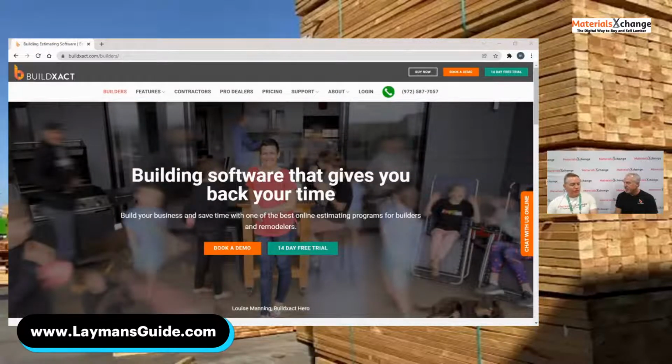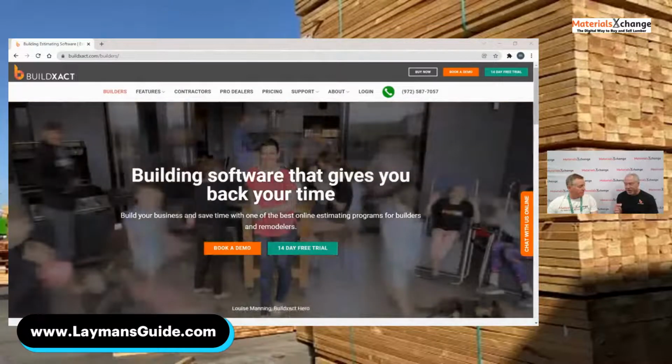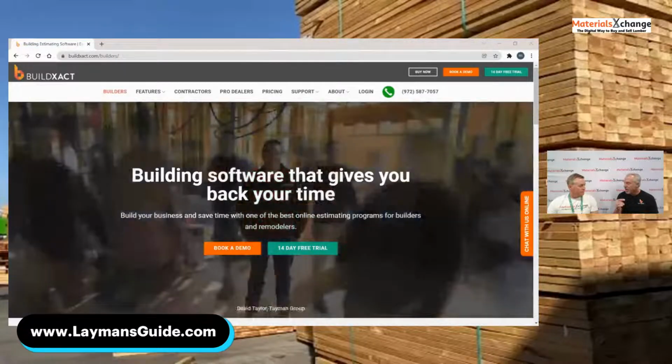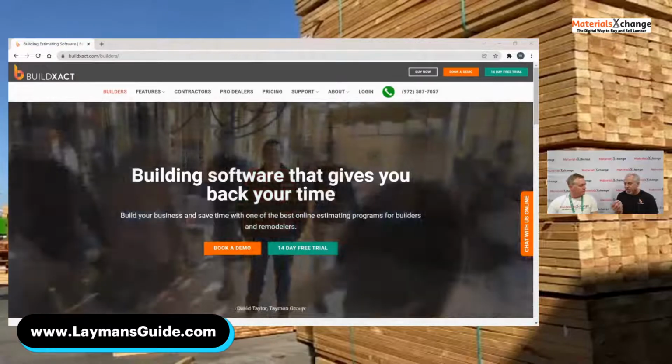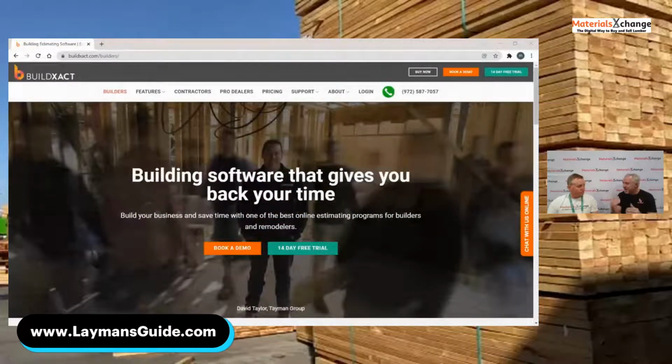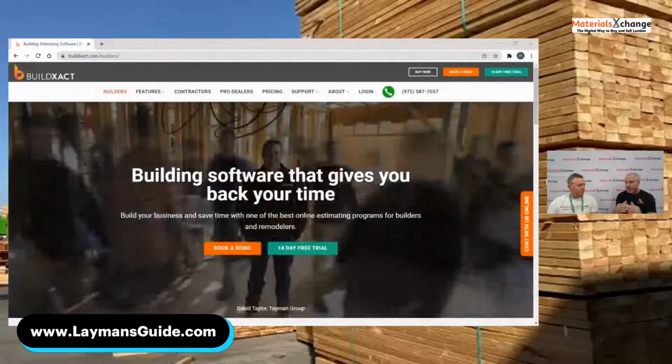And you probably can hone in on, that particular material didn't turn out so well. Yeah. Or that style didn't turn out so well. Yeah, you can see, right? I guarantee you every builder out there has biases, right? So they will see that if they look back over those 10 projects, wow, they continually, against this product category, underestimate. Right. One of the trades continually underestimated. So the project can flag that for you. It'll give you a big red sign saying, hey, you are underestimating. It's a practice, it's a bias you have, and it gives you opportunity to correct for that with the next jobs. Eventually, you clean up the processes and become much more effective building.